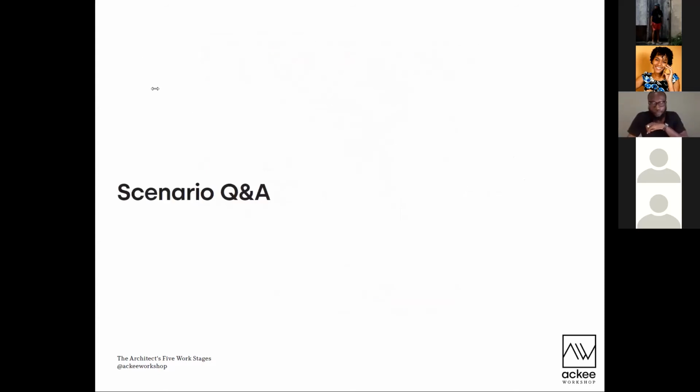Hi, everyone. So I just want to give a quick scenario. At final design stage, that's where you iron out all the details of the building for the client to understand and make a decision to move forward. So this part of our service is where we cut off. So any changes after this may incur additional charges depending on the architect working, right?